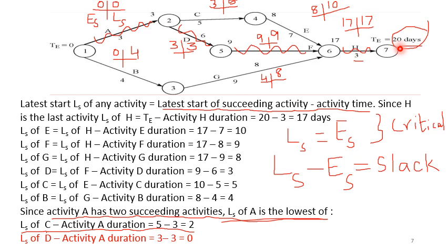So once again, note, for all activities in the critical path, or for all critical activities, slack is equal to 0. For all non-critical activities, there is a slack which is attributed to that particular activity, and that non-critical activity can be delayed, say, in emergencies. It's always not a good practice to delay, but sometimes if some situations demand a delay in a particular activity, first find out.